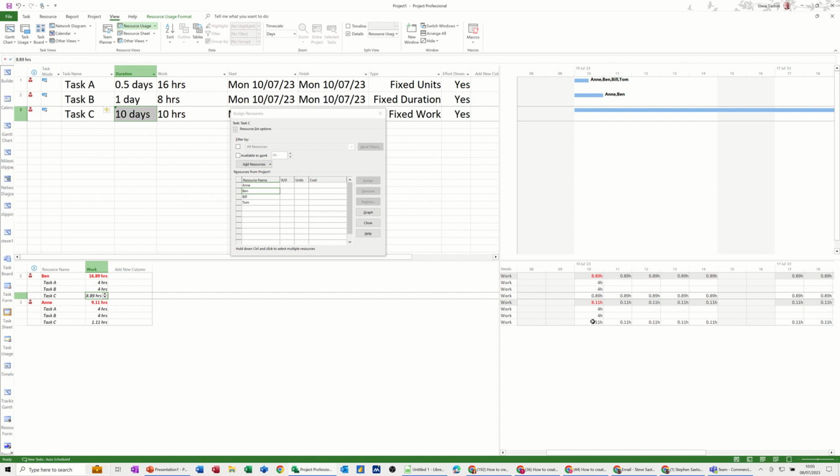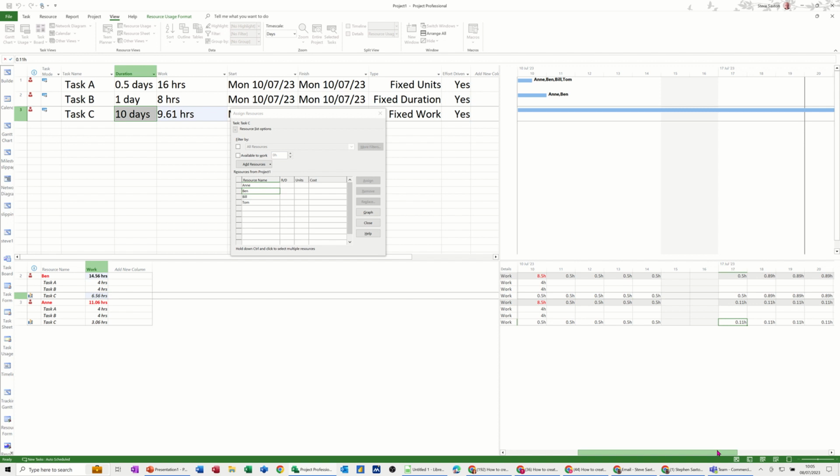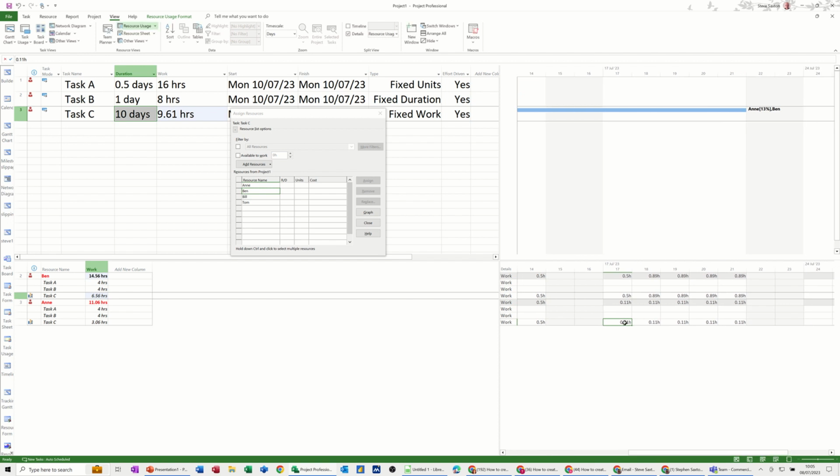So instead of having this at 0.9, you could go, for example, 0.5 and then 0.5 on there, and then basically just pull that across, so it's 0.5 all the way across that week, and then do the same up there. So then you're basically changing what the computer's done, but it makes more sense if they're just doing half an hour each. So 0.5 on that one, and then you just click on, pull it over with a little black cross. So then they end up doing exactly the same time each. So now you've got 5 hours and 5 hours.